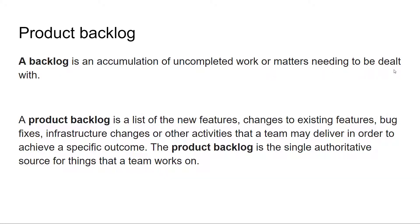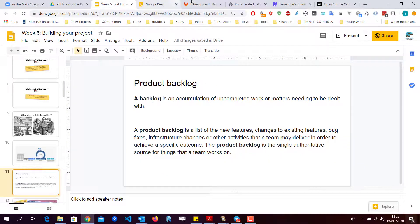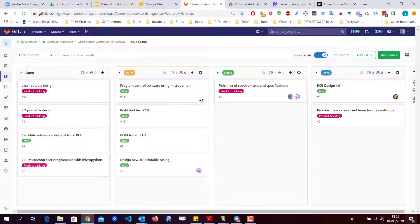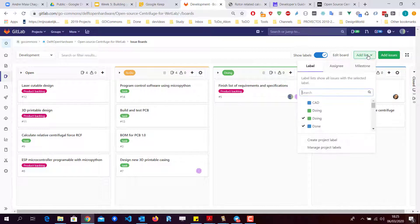A backlog is basically an accumulation of uncompleted work or matters that need to be dealt with. A product backlog is a list of new features, changes to existing features, bug fixes, infrastructure changes, or other activities a team may deliver to achieve a specific outcome. In Scrum, the product backlog is the single authoritative source for what a team works on. Everyone interested in your project should be looking at it — if it's not here, it's not relevant to the project. I'll now demonstrate creating a sprint backlog label.